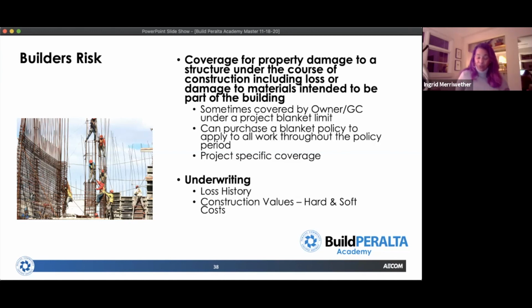And so it's important for you when any project you're working on is to find out, well, who's got the builder's risk policy for this project? And to be honest with you, you should actually get a certificate of insurance because you're covered, should be covered under that builder's risk policy. The named insured in the policy should read the prime contractor's name, probably the project owner, and language that says, and subcontractors of every tier, because the intent is the builder's risk policy should cover any contractor who suffers a loss for materials or work that was already done for which they have not been paid.